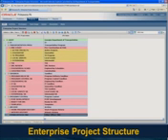There's also this concept of having a sandbox. In Primavera, when we talk about a sandbox, this is just an area where users would be able to make copies of projects, to do what-if analysis, or to do work on projects that you don't want to put into your live current schedule. So each group would have their own sandbox in addition to having a node for their active schedules as well. Does anybody have any questions about this EPS structure?